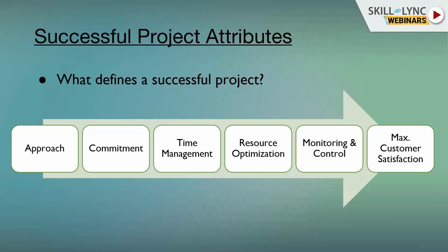Now coming to resource optimization. Resource optimization means if there are 3 or 4 resources assigned to a particular task, we need to see how much idle time they are taking. So allocating a particular resource to a particular activity, analyzing how much idle time they are taking, and utilizing that idle time in another activity is known as resource optimization. So how can we use the existing resources in a particular project so that the idle time is less, or least, I should say.